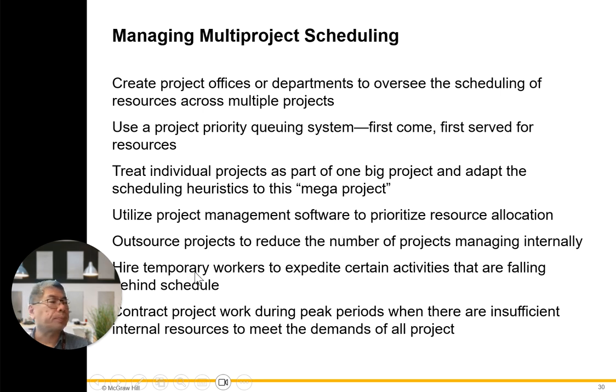Hire temporary workers to handle certain activities that are falling behind schedule. And then let me just go back. Contract project work during peak hours, when there are insufficient resources to meet the demands of all projects.